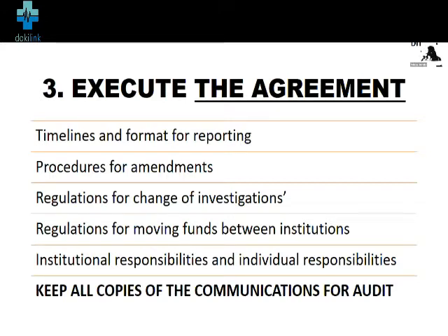The agreement, for example, has a definite timeline. So if the agreement says the study should be done within 10 months, then it means that study should start and finish within 10 months. If the study says five years, you should work with the timeline in mind and have the deliverables in mind.